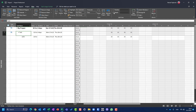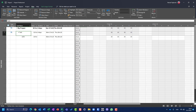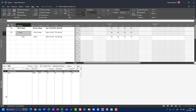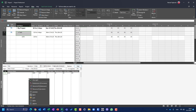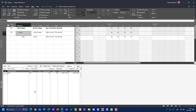How can I do that? I can choose here 'Details' on 'View Details' task form. Here on the lower part of the screen you can see the task form. I will right-click and choose 'Schedule'. There you will find the 'Delay' field. If John is supposed to start on Wednesday, delay is two days. I will put two days and click OK.